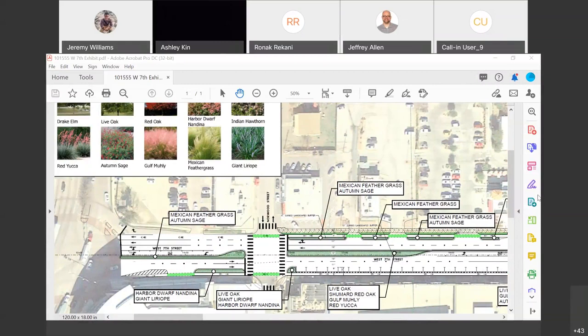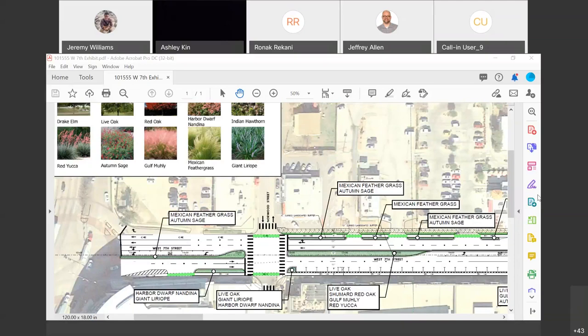Will the dash continue to run during this project? Yes, it will. Like I mentioned, we're going to be coordinating with Trinity Metro to temporarily relocate bus stops as needed. But it will continue to run.